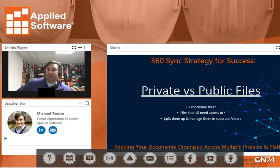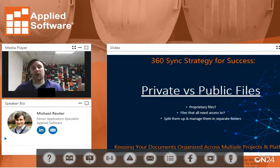Well, oftentimes you have proprietary files that are just for your company, things that are maybe contracts or cost information or change orders or estimating data. You don't want to expose that to everybody, like all the subcontractors out there, the owner, the architect, or the general contractor, whoever it may be. So sometimes it makes sense to start out with your folder tree having a public folder and a private folder.